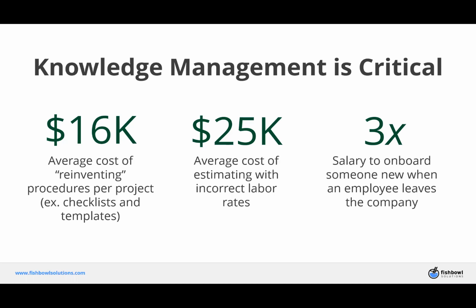In the instance of labor rates, this can be quite costly when putting together an estimate for a new project. The old rates result in a discounted cost to the owner and a loss of profit on the project. And in the studies that we did, that could be up to $25,000 per project, which again, spread out over a number of projects, adds up quite quickly.